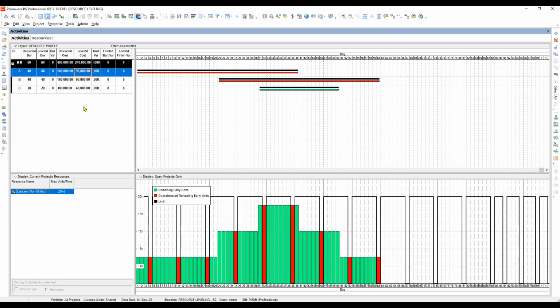Okay. So that means only on the condition that the over allocation is addressed or resolved by the alternative method of reallocating or reducing the resource assignment will there be a variance between the two projects. Other than that, the cost variances are all equal to zero.